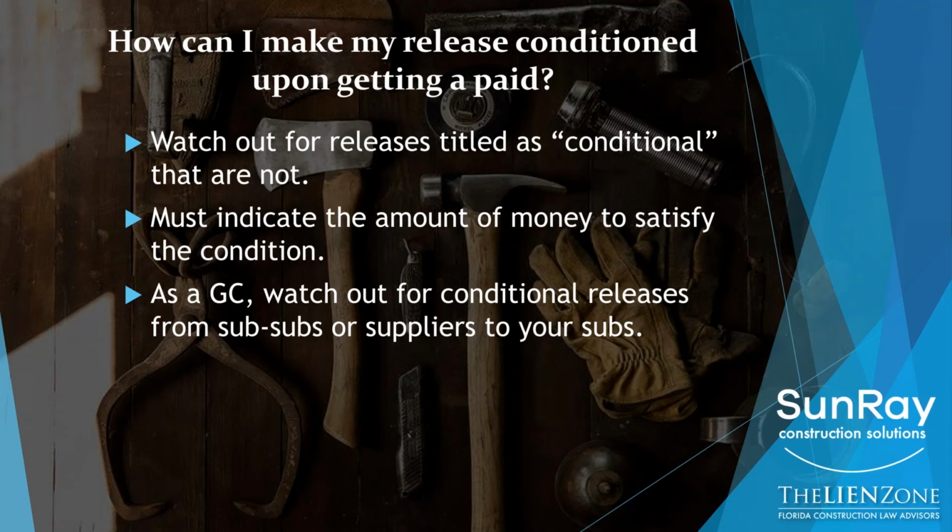If I'm the GC and I get a conditional release from someone that I'm not actually paying, then you have to be careful, because if you pay the plumber and the plumber doesn't pay the supply house, this release that I received as the GC from the supply house that's conditional is now no good because they never got the money.